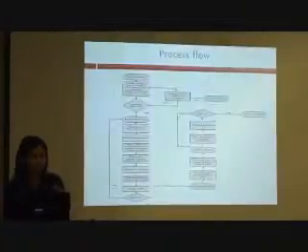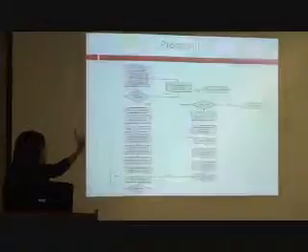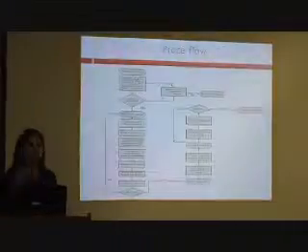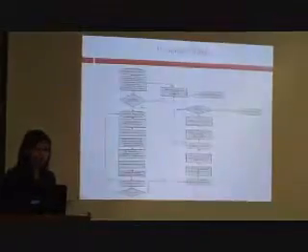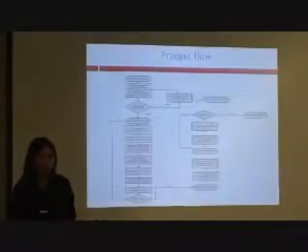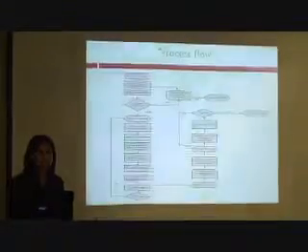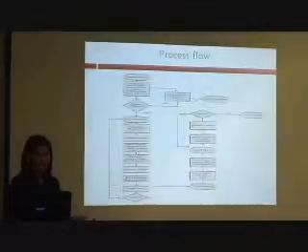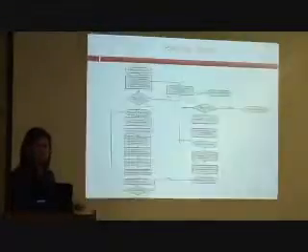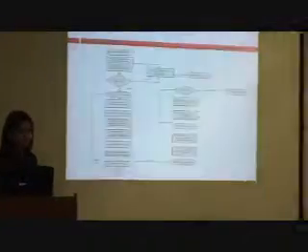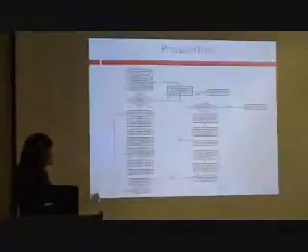After getting approval, we proceeded into the project planning phase. If we hadn't gotten approval, the process was to go back to the sponsor again and receive that approval. But in our case, we did get approval. We moved forward into the project planning phase. The first step there was to discuss the functional requirements. Once the functional requirements were discussed and formulated, we formed the project team, assigned roles and responsibilities, and started brainstorming the project charter, goals, and objectives.